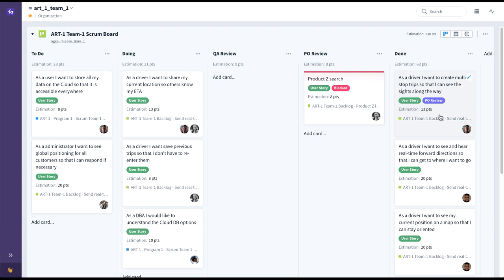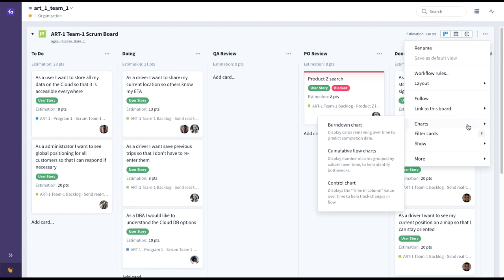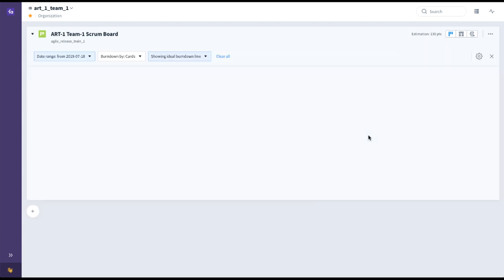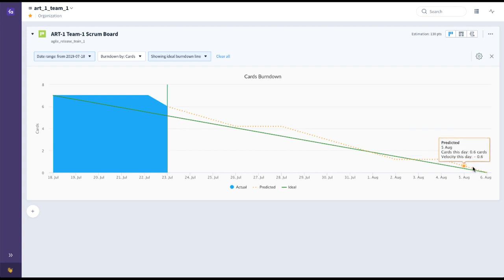To track progress during any particular iteration, there are charts built directly into the board — a burndown chart, cumulative flow chart, and control chart. If we take a look at the burndown chart, you can see when this team is expected to complete the work that they've committed to.